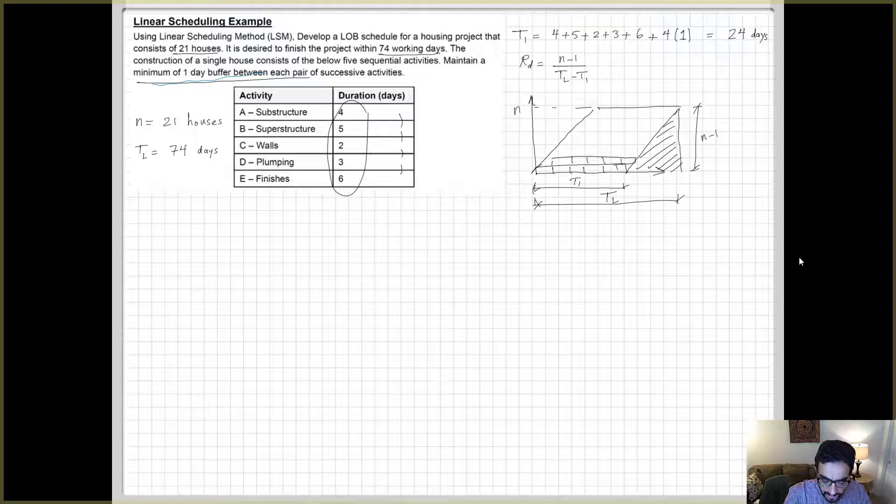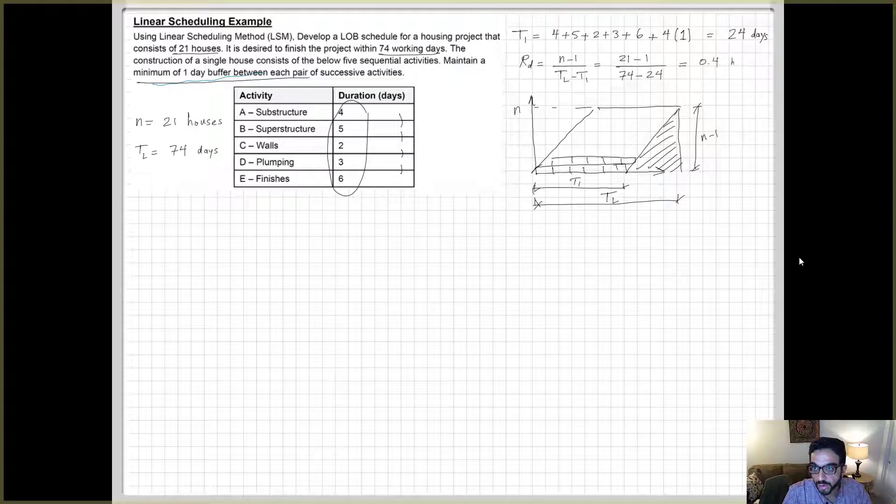So this shaded area through the triangle, the rate of the inclined line here is N minus one divided by TL minus T1. It's a rough estimate of how fast, how many houses I finish per day. Because in the first five days, you don't finish any houses because it takes you 24 days to finish the first house if you do things back to back. But it's a rough indicator of how fast your project moves overall.